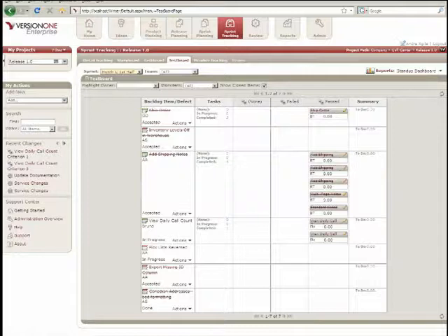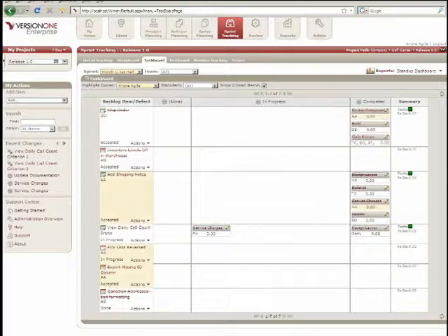You can actually close that task on any day, because the close date, as long as it happens within that iteration, doesn't really matter. What matters in terms of your metrics or your burn down is when you burn it down. So the key is to burn down on the appropriate day and close it whenever it's been accepted.